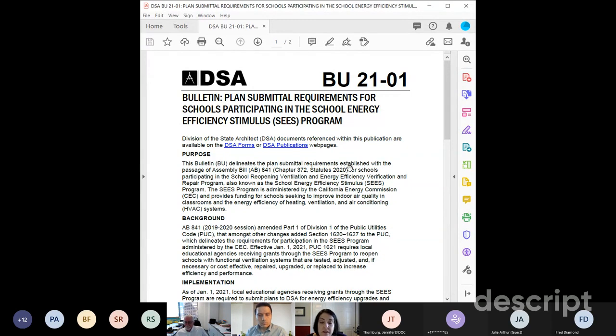And essentially it's informational, and it doesn't really trigger a considerable amount. The projects are required to be submitted if they include HVAC improvements that trigger certain requirements as per IRA 22, specifically structural improvements. Obviously, when structural improvements occur, it also triggers other disciplines: fire, life safety, and access. But for all these projects, you would need to refer to IRA 22 to determine if the project is exempt, and if not, it does require going through DSA for review.